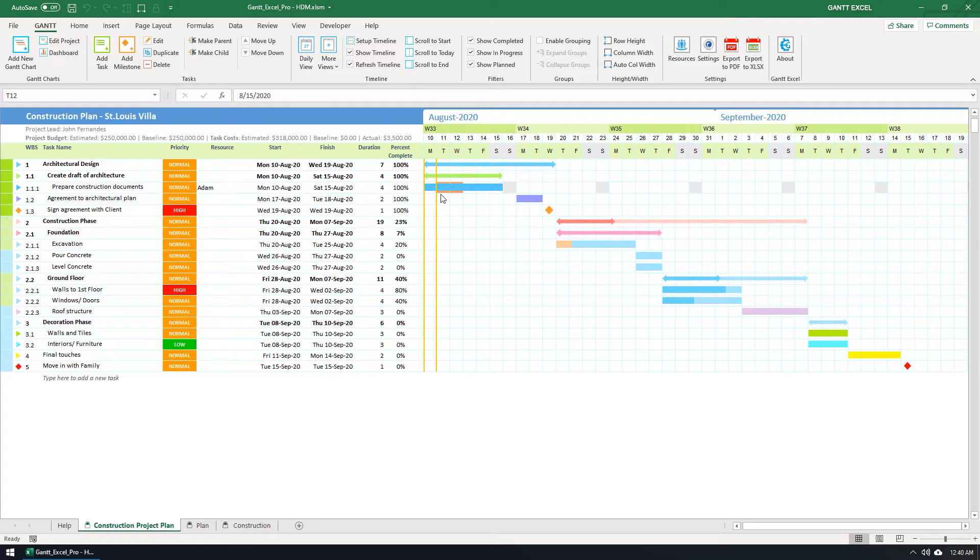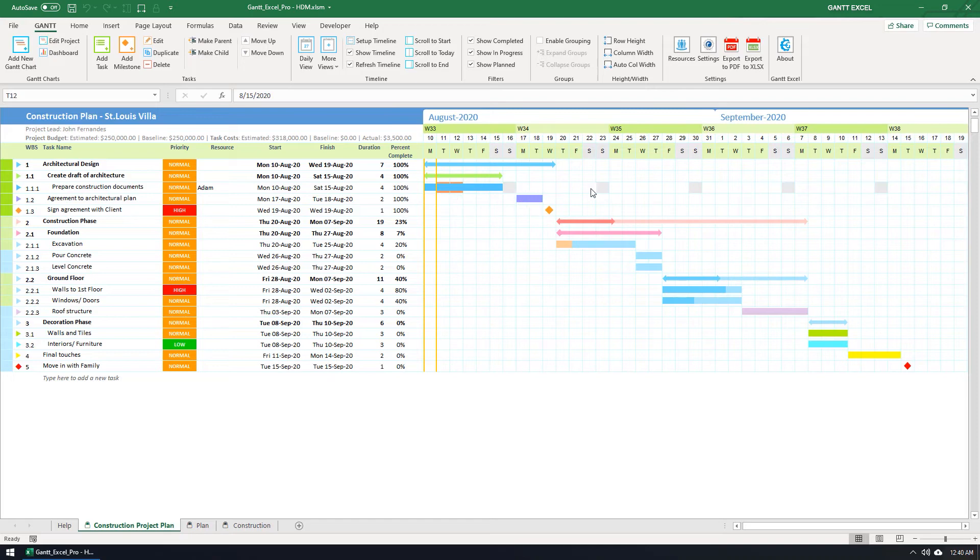The timeline bar for this task has updated and since the other tasks are linked up by task dependencies, they have moved as well. You will also notice that Gantt Excel has automatically highlighted the vacation days for Adam and the work off days as well.